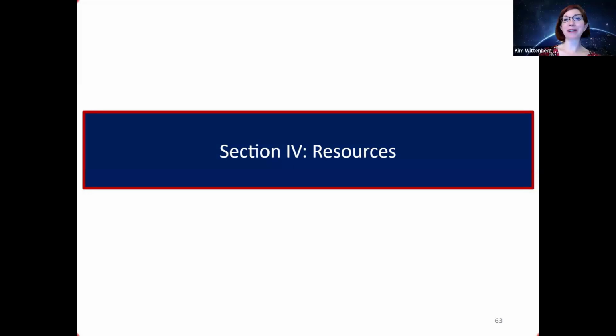And one other quick question, why is this a 2-step process? A 2-step process is a down select, and that's to reduce the amount of information that you have to review as technical evaluators to help streamline the process, to make it smoother. It also provides the vendor the ability to get feedback earlier in the process, which can help save them bid and proposal cost dollars so they can spend that money elsewhere where they could potentially get an award.